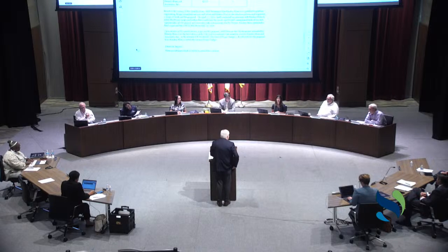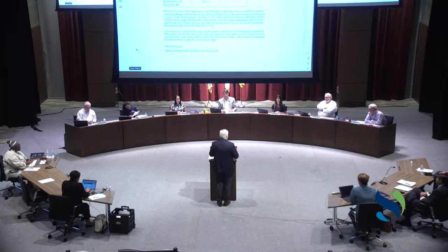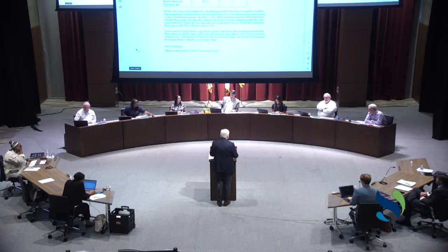Okay. So on all of your metrics, do we have an on-call program for these kinds of services? We do have on-call. However, in the case of this federally funded, relatively specific program, we're required to go with a qualifications-based selection to select a consultant for this particular work for these particular dollars. For instance, for T-SPLOST, by contrast, where we're not bound by those federal regulations, we use our on-call designers. Kristen talked to you a little bit earlier this evening about some traffic signal design with modifications we're going to make on Hammond Drive. She's able to utilize, since it's local funds again, those on-call traffic consultants that we have on hand in order to do that work. With these specific regulations requiring the qualifications-based selection here, we don't maintain an on-call.